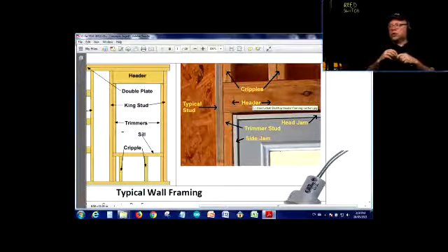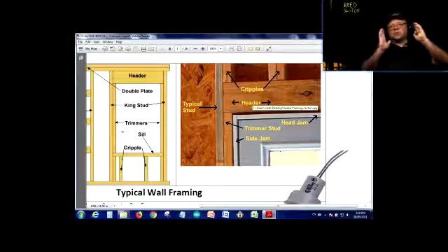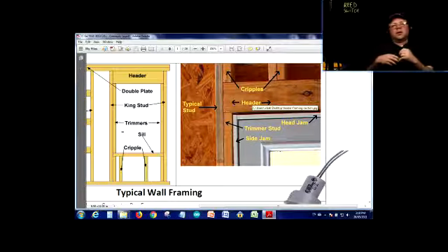So then, of course, the cost of a regular reed switch might be sometimes $2, $5 per switch or so. Then the wireless door contact would be run on surface mount, which means it's going to be attached to the door frame so you can see it. It's going to be a lot more, a little bit less than $100. So there's a difference between $5 and $100.